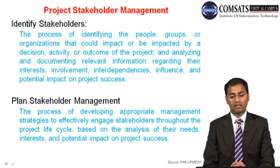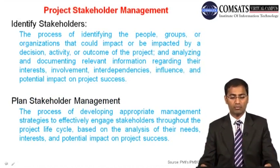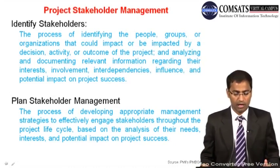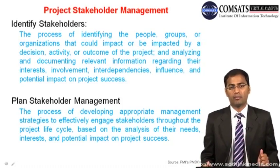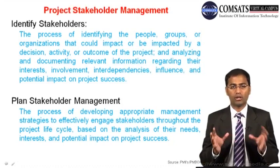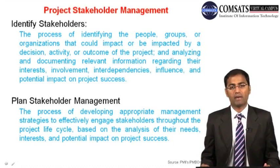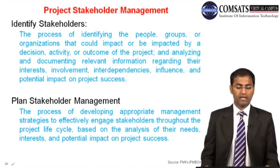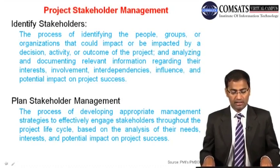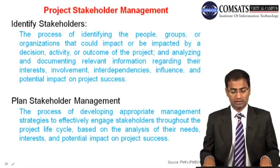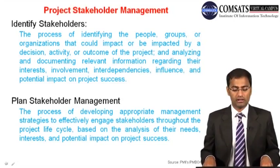Project stakeholder management is one of the new knowledge areas in project management, with four processes included in PMBOK 5. The first process is to identify stakeholders — this was part of PMBOK 4 as well, where it was part of the knowledge area of communication management. Now a totally new area has been devised for stakeholder management, giving importance to this field. Identify stakeholders is the process of identifying people, groups, or organizations that could impact or be impacted by a project decision or activity, and analyzing and documenting relevant information regarding their interests, involvement, interdependencies, influence, and potential impact on project success.